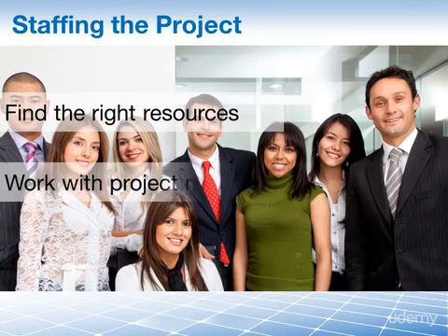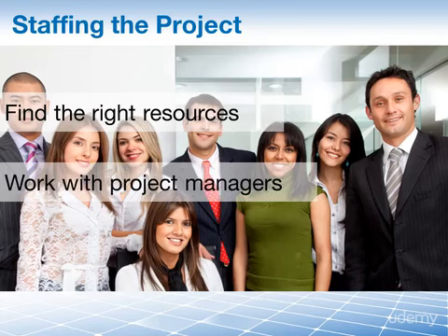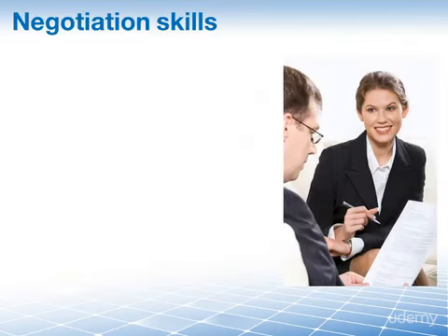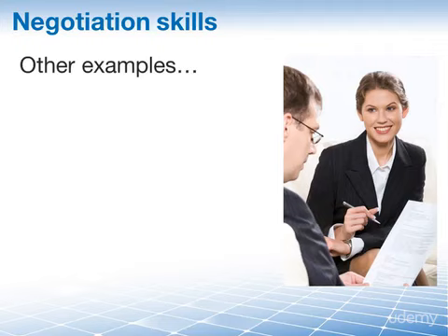You also might need to work with other project managers in order to share or acquire employee resources that they have on their projects with key skills or capabilities, and you may have to negotiate with the functional managers depending on your organization's organizational structure so that they will release some of their staff to work full-time or part-time on your project.